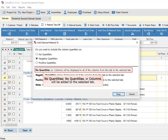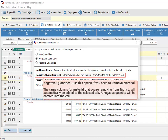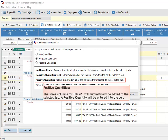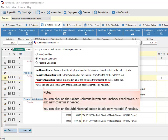No Quantities: no quantities or columns will be added to the selected tab. Negative Quantities: use this option if you need to remove material — the same columns for the material being removed from tab number 1 will automatically be added to the selected tab with a negative quantity entered into the cell. Positive Quantities: the same columns for tab number 1 will automatically be added to the selected tab with a positive quantity entered. You can click the Select Columns button to uncheck checkboxes or add new columns, and click the Add Material button to add new material if needed.